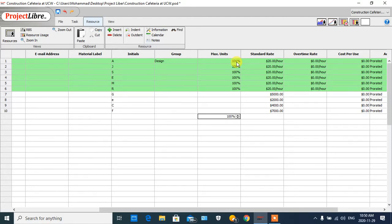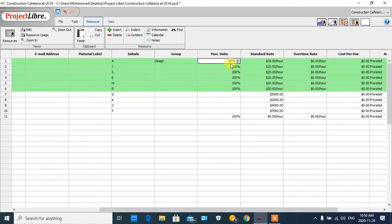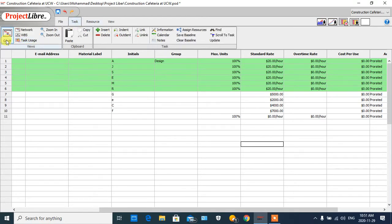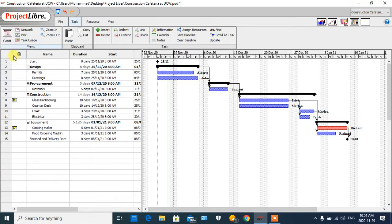For the maximum availability, if they work eight hours per day — that is full-time — we put 100%, meaning they are fully available. Or they can work part-time at 50%, or maybe we have 70% or 80%, as we define for our project.